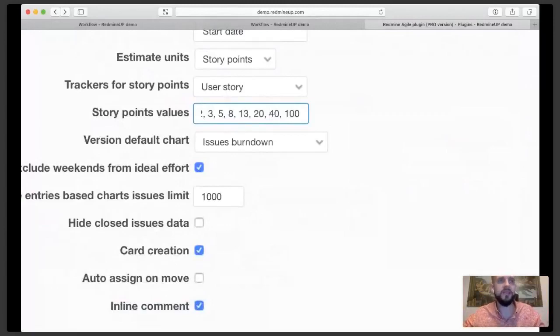If the tasks are too complex, for example, you assume the task will take 20 or 40 story points, or like in our calculations, let's say more than 48 hours of work, maybe more than 20 hours of work, then you have to break it down into smaller issues, smaller parts.